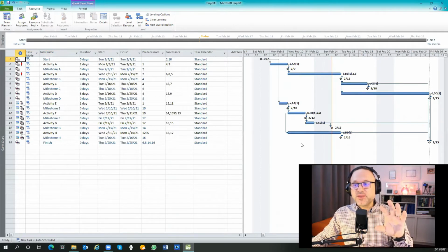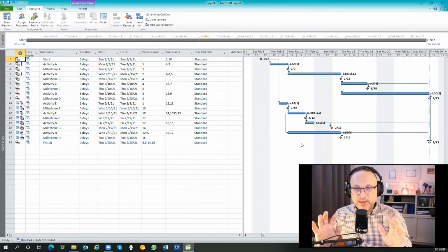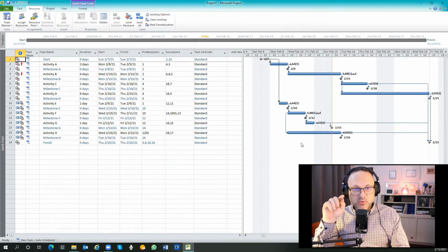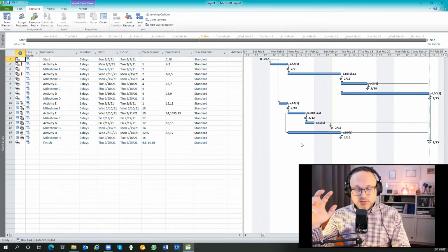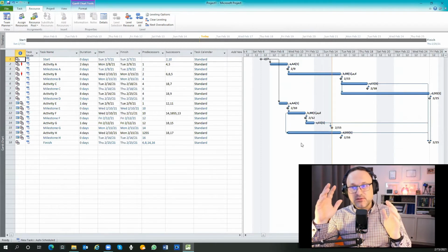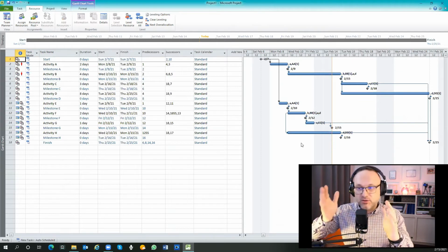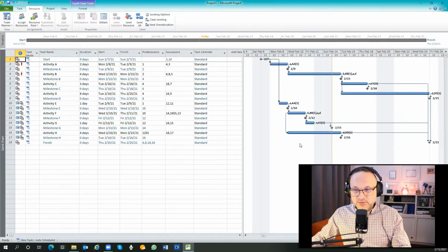If you put it in this way, it looks okay. But when you want to make it into execution in the correct way, you will face a problem that this person cannot be divided into many activities at the same time. So you need to do something, and this is the resource leveling.